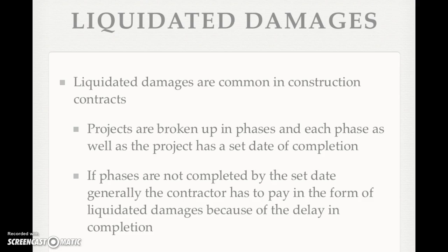the airport actually had to move around a bit in the different areas and the different phases that need to be completed on time. So for them, it was very hard if a phase wasn't completed on time, because then they couldn't do what they needed to do. So that's why a lot of times liquidated damages do occur.